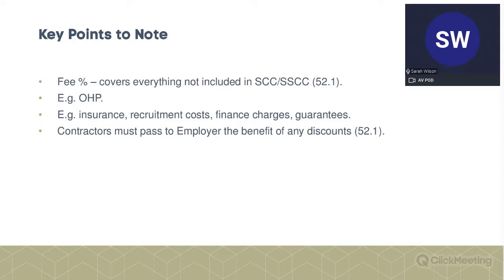So when I'm talking about types of contract here, I'm talking about whether you're on A and B, so this is really only relevant to your compensation events. But it's really important if you're on options C, D, or E, and particularly E, because this is what you're going to get paid, or, if it's not done properly, what you're not going to get paid.